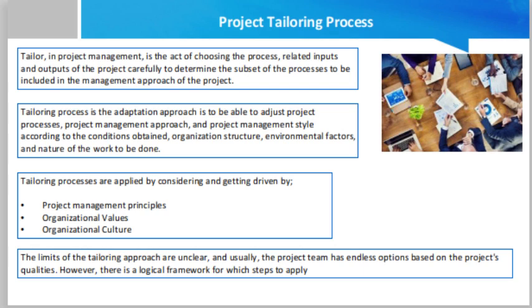It cannot be possible to maintain a project without knowing how to do it. Therefore, the first step of the tailoring approach should always be the determination of the development approach. The second one is the aspects of your organization. Any project should be compatible with the structure and culture of the organization. Therefore, the project should be tailored to adopt the organization well. After taking the organization into consideration, you can tailor your project and processes according to the project work. Your options here are limitless.